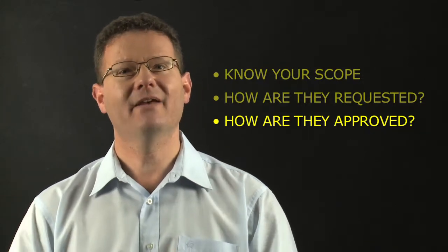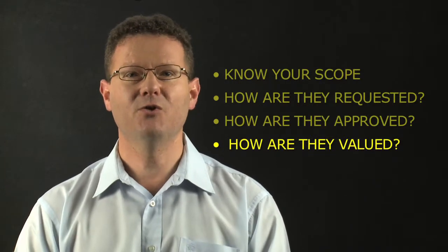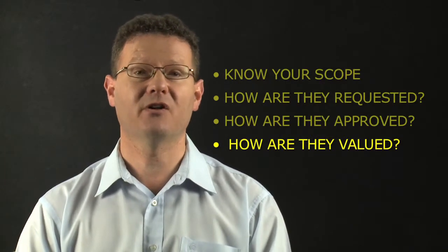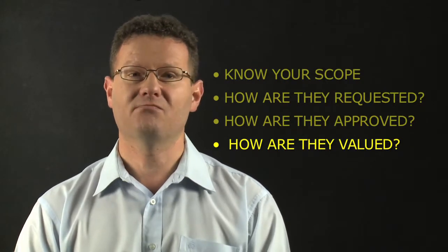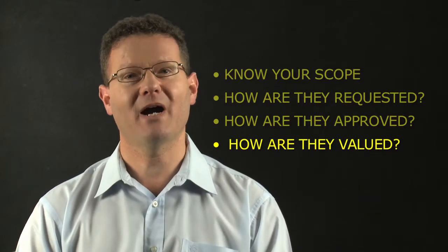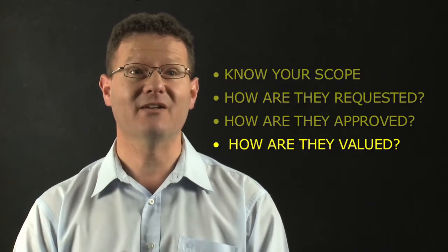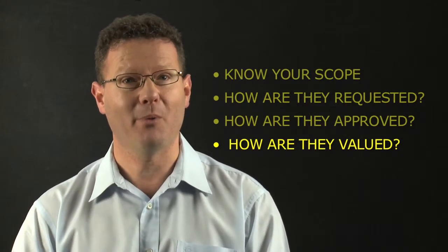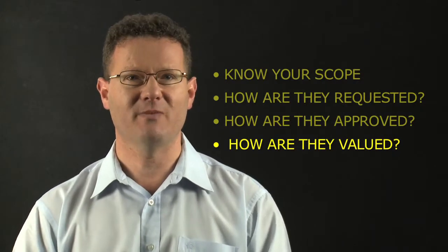And from that, how are your variations valued? So who decides how much is the value decided by the quote that your client accepts? Is it reasonable value? Is it the superintendent's opinion of what the value is? Again, approval is part of the process, but how your variations are valued is really the pointy end of the stick because that dictates what you get paid. Okay, so you need to understand how these things are going to be valued.